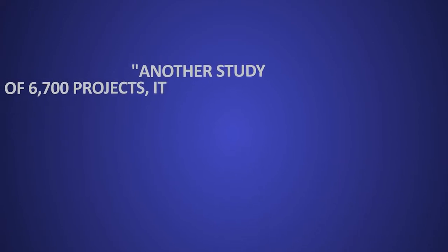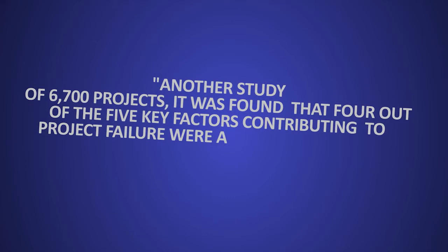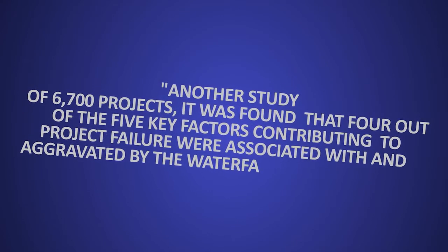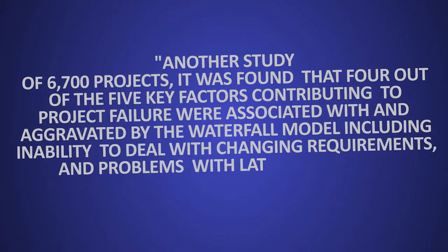Larman also pointed out that in another study of 6,700 projects, it was found that 4 out of 5 key factors contributing to project failure were associated with and aggravated by the waterfall model, including inability to deal with changing requirements and problems with late integration.